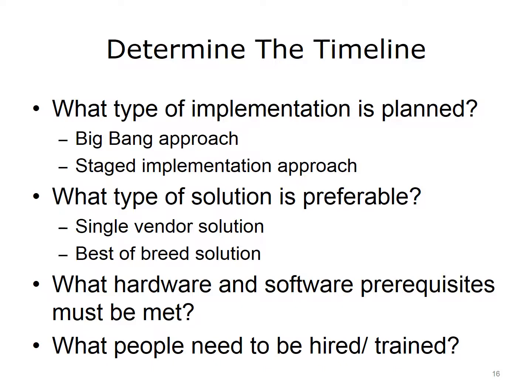Purchasing an entire suite of EHR services from a single vendor has some advantages. The primary advantage is that the organization deals with only one vendor who is responsible for the entire spectrum of EHR functionality and for supplying, upgrading, and maintaining the EHR. Additionally, a single vendor approach eliminates concerns about interoperability between modules, and contract negotiations are often less complicated. A single vendor approach also ensures seamless data sharing across the organization.